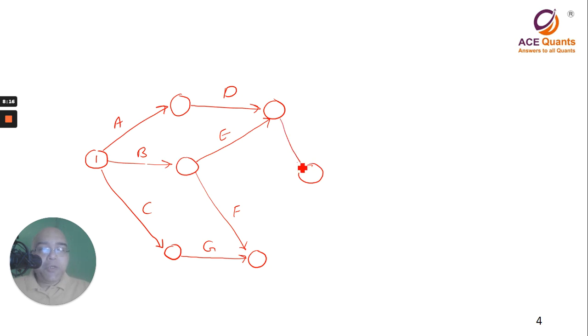So this will be my H. And to start I, there should be one place where G and F are completed. So I would draw I like this, but then the next activity J requires H and I to finish at the same place. So I will construct I like this. And finally, I am going to talk about J. Now, this is how you are going to make a rough sketch, and once you make a rough sketch, you can then make a final sketch.